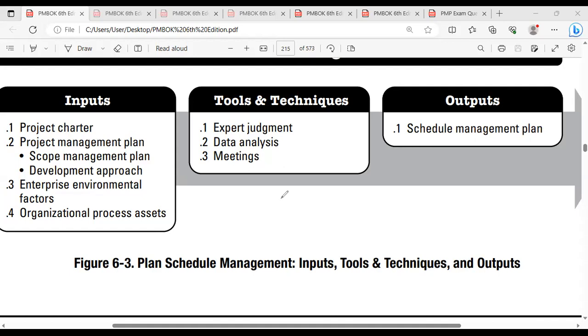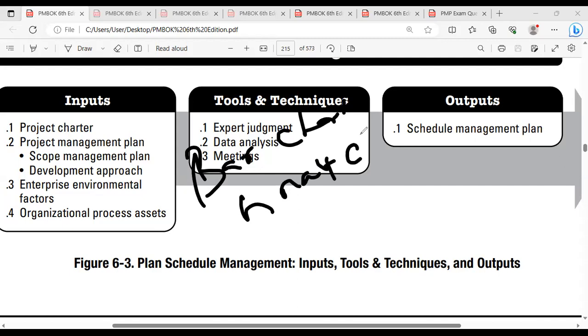To know the progress, you want the actual bar progress chart on the plan bar charts. Gantt chart and bar chart are the same, but in a bar chart you have the pure bars. You don't find any arrows between two activities. But if relationships are connected between the activities, then this chart is called a Gantt chart. There is a minor difference, but people use bar chart and Gantt chart interchangeably.